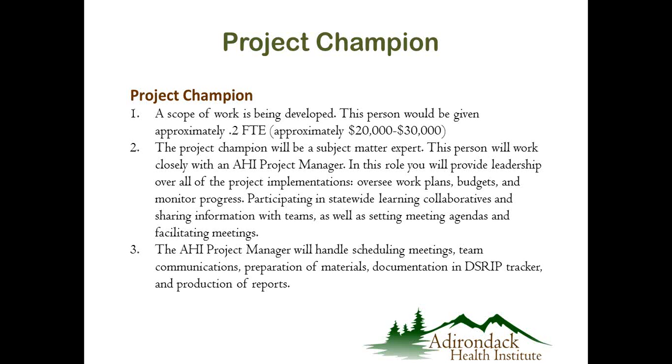The project champion is going to be a subject matter expert. They will provide some leadership in the project implementation. They would participate in statewide learning collaboratives and sharing information with the teams and helping to set agendas. But they would work very closely with an AHI project manager. The project manager at AHI will handle the logistics, scheduling meetings, communications, preparing materials, and documentation in the DSRIP tracker and other reports that need to be done.